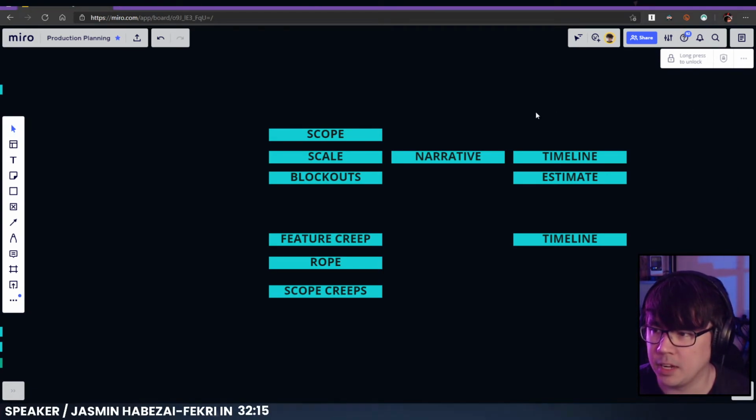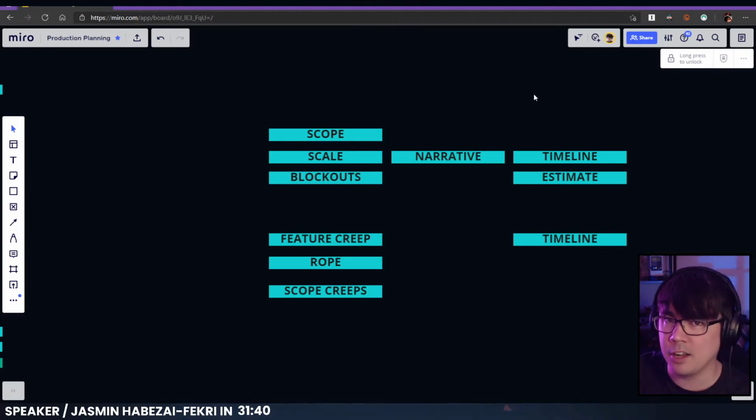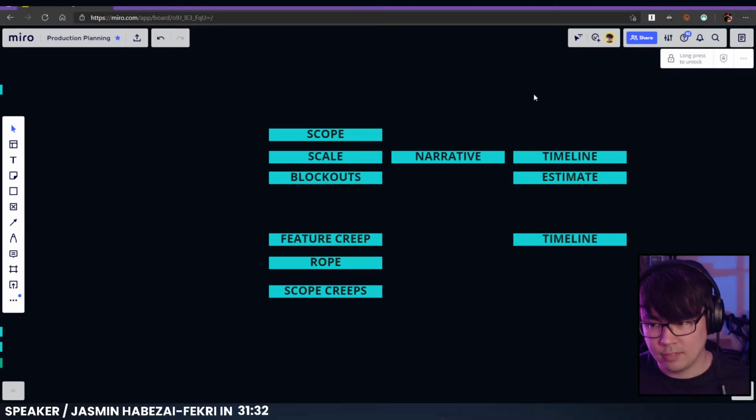So how do you get an estimate if you're learning on your own and doing things for the first time? That is a great question, and Pontus's answer is pretty spot on. You just make the best guess that you can, and then see how far off you are. If you're a really optimistic person, like I can be, I'll say this thing's going to take maybe 24 working hours. Because I'm optimistic, I've learned to add another day onto that estimate. And if it was actually what I estimated, then I'm getting better at estimating. But it's an estimate, not a precise measurement.